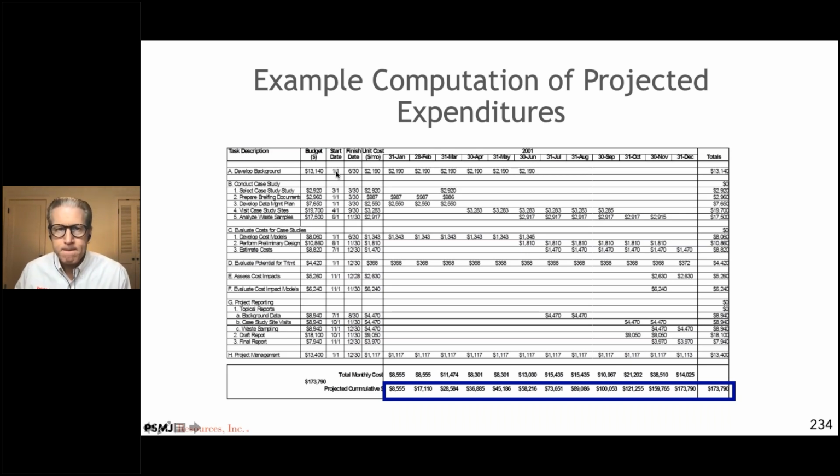Yeah, that makes sense, because then it could either be an average a little bit more or a little bit less, and then it still works out. That's the key thing. And when I'm talking to a group of architects or landscape architects as well, Seth, the group tends to be a little bit of an easier going bunch. When they say just what you said, a little bit more, a little bit less, it kind of makes sense. We average out. By the way, it's simple, right? We just divide 13,140 by 6. We get 2,190, not a big deal. It's a nice flat line.